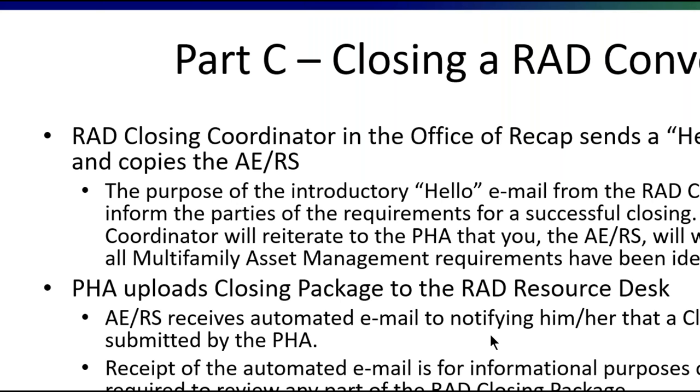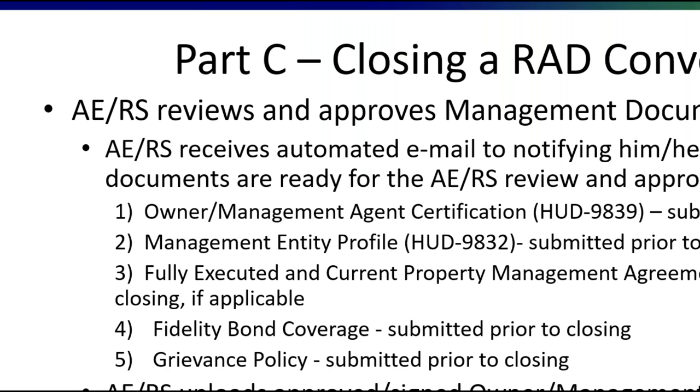And during this time, the closing coordinator will continue to work with OGC and other divisions in order to finalize all of the RAD-related documents and approval. This process in itself can take 30 to 45 days. Then we move ahead. So the AE and the RS review and approve the management documents at the same time, all of this prior to closing.